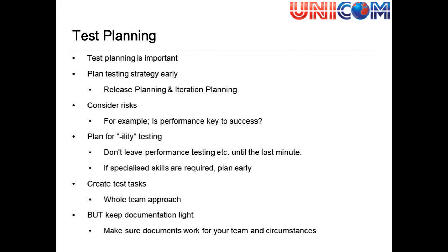Plan for the utility testing. So we're not going to leave performance testing until the last minute. I mean, ideally we would have all of our performance testing on non-functional requirements as part of a definition of done and starting from day one. But again, it's about assessing the risks. Can we start performance testing a little bit later in the project when we know more and we've uncovered more?